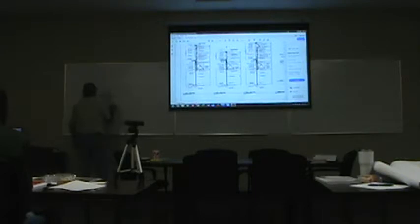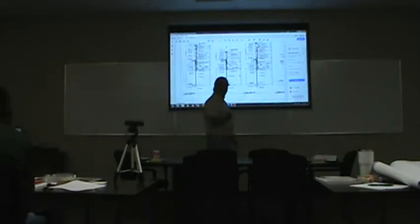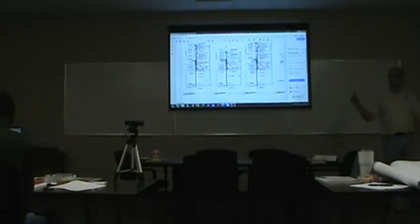Who does the metal studs? Framer. Let's just call that metal stud man, okay? Who does the dens deck on top of that? Same one. Framer, if it was ply, it'd be done by the carpenter, right? So you know from going over your subcontracts with your project manager, which subcontractor is responsible for which piece of work, right? You get a copy of the subcontracts, it has an Article 1, and there it is.